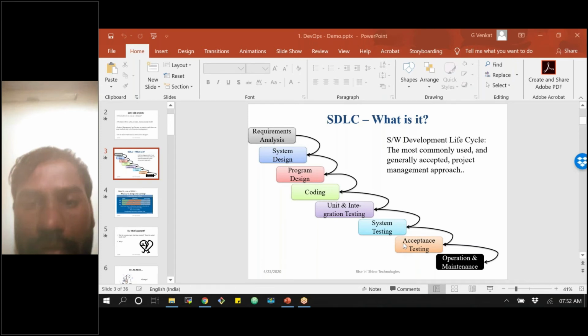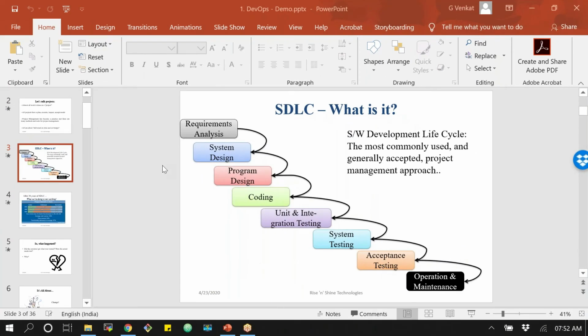If the change is small, they can do it immediately. But if the change identified or reviewed by the client requires some time, then that time has an impact on the release date, and it will be extended. They planned it for a certain date, but whenever a change is identified, it goes through all the phases and takes more time. That time has an impact on the current release.